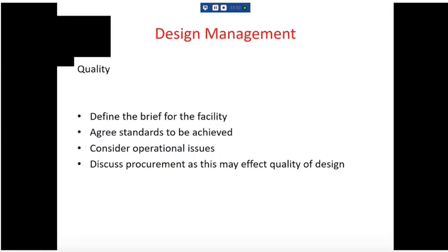And then procurement. We'll come on to this in future lectures, but at the university here at Liverpool, really once the architects have completed some sketch schemes, they immediately involve a contractor. And the contractor starts to say, right, well, I wouldn't do it this way, or I'd make it out of steel frame, or I'd use concrete. And they then start to have an impact on how the design is moving forward.